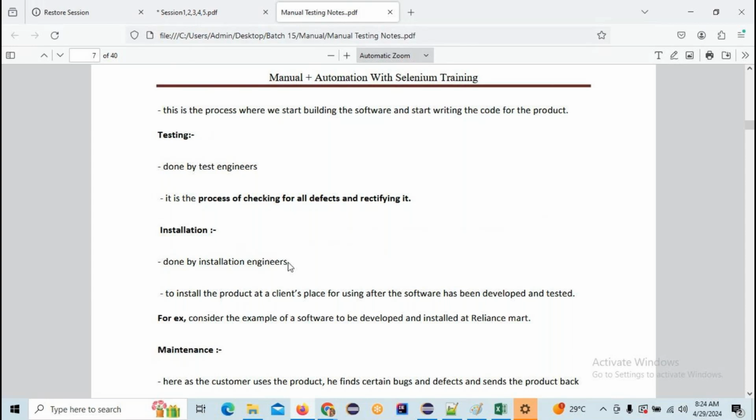After that, if you want to go back to develop a new feature in the development stage, it's not possible. You should start from scratch again. You should do the requirement analysis again, the feasibility study again, the design again, and the development again. So after you come to the next phase, if you want to go back to the previous phase, it's not possible.